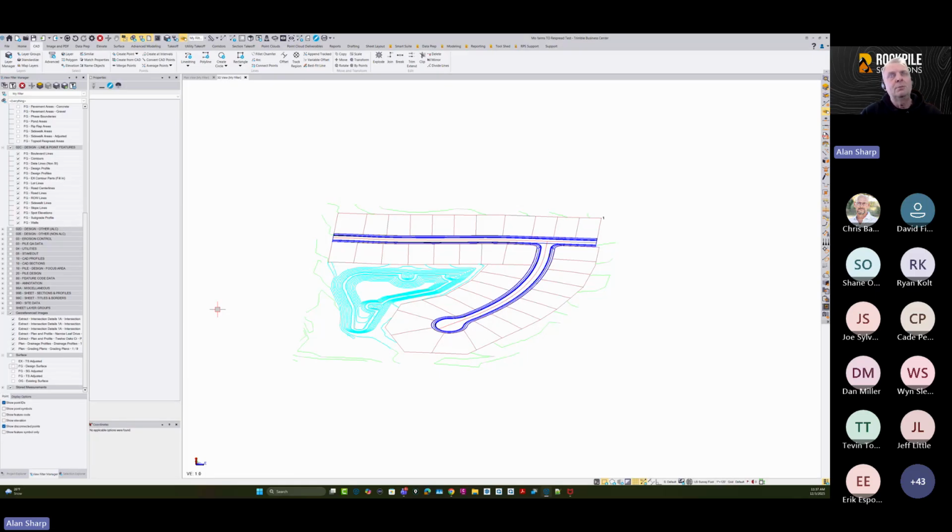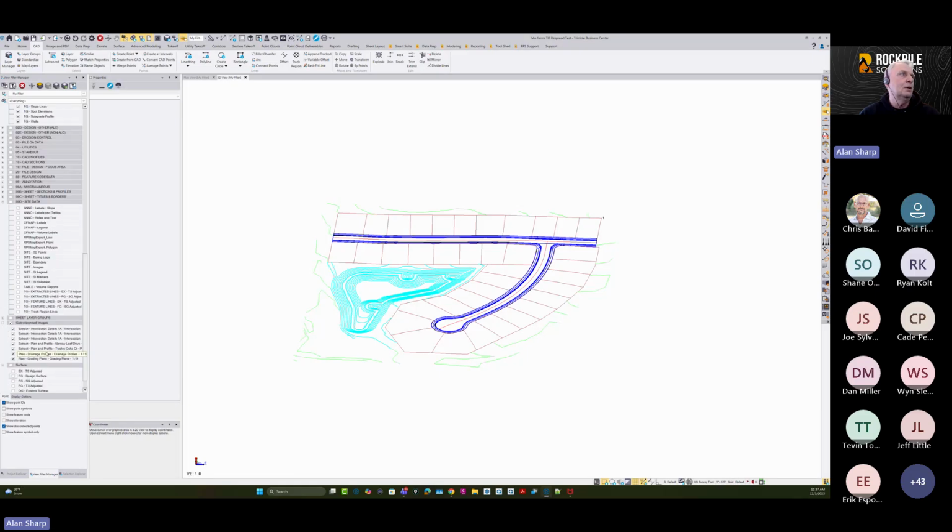You can run a takeoff report between any surfaces you want. You can apply whatever features to whatever surfaces you want. You can create as many subgrade surfaces as you want, and it's totally under your control. And when we build it, all the line work that gets used to build the subgrade surface is put on some takeoff lines layers, which are put into the site data layer. So you'll see when we open up the site data features here, there's these TO lines layers. These TO lines are the lines that get used to build the subgrade model.